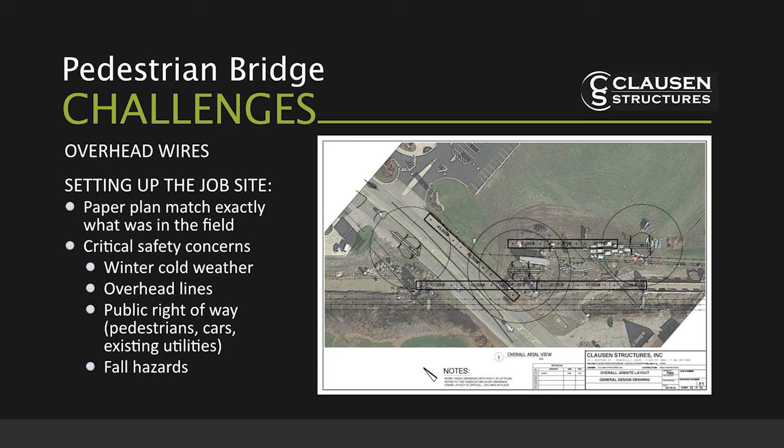Yeah, we actually went down there ahead of time, as part of the pre-planning, and found a fixed benchmark that was in relationship to what was down there compared to what Google Earth had. So I was able to capture that image, and just ironically enough, it actually showed the job site, which helped that much more. I inserted that into my overall CAD drawing, and was able to lay out the cranes and the bridge, and the staging areas of where everything was going to wind up.